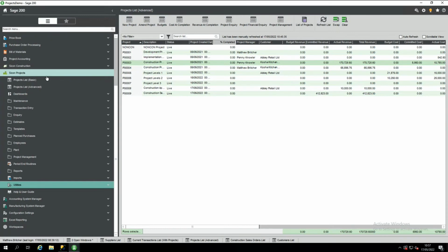Yeah, so it's about timing really. So you can recognise revenue in a month for the application being raised, even though you're not going to get the invoice out or the valuation agreed until the following month. So you can make your accounts look appropriate for the month that the work was done in. All right. Okay. Hopefully we've explained it.